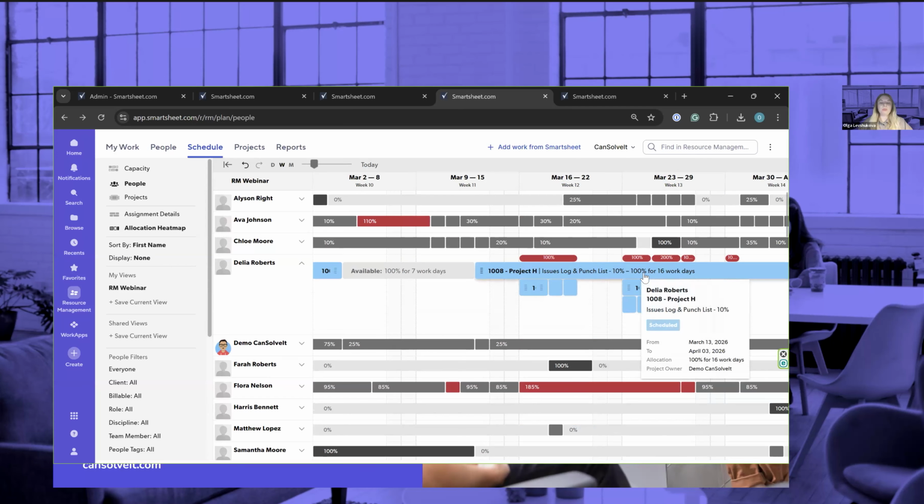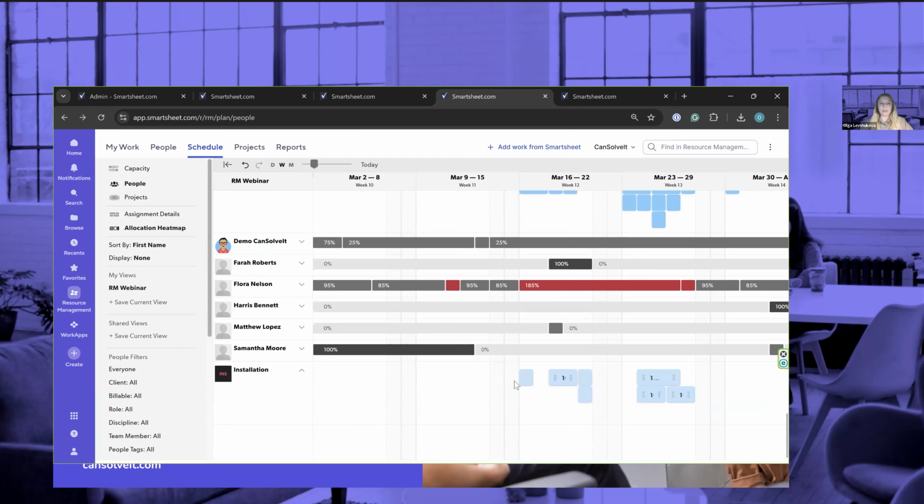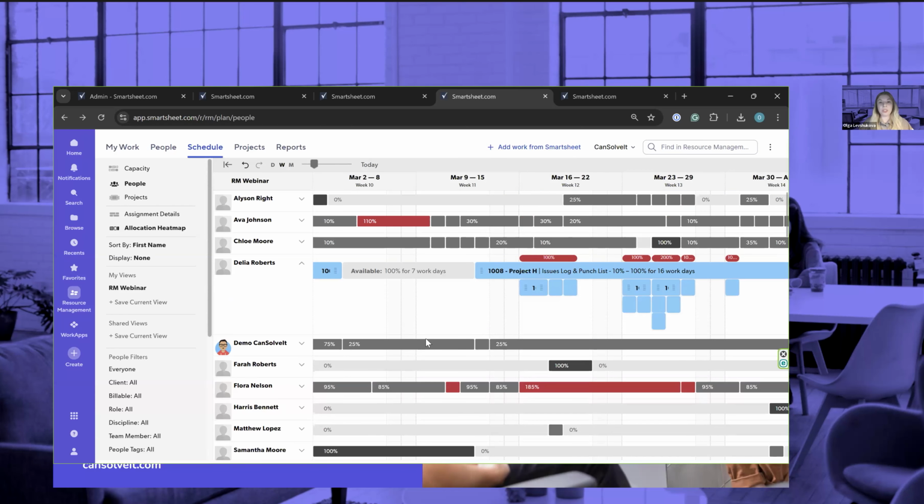So you can either reassign, split the schedule and reassign, or simply reassign the whole task for this project. Or you can use placeholders and reassign them later. You can come back and you will see anyway that something is off. For example, in this case, right? You see some assignments. You can add more placeholders. I just added one. You can add placeholders for engineers, for example. Maybe you would need more engineers or designers or whoever you need. So this is how you work with your overallocation.